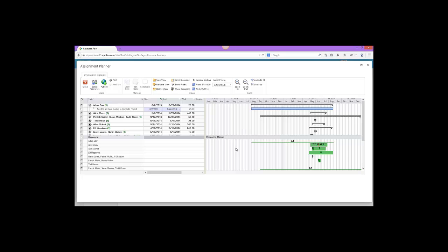work, including time off, etc. And I can zoom in and zoom out and see if they're over-allocated and make adjustments. But this is all what if again, right? I'm just trying to see if there's a solution to these problems. Once I get it the way I want it, I can then publish that out.